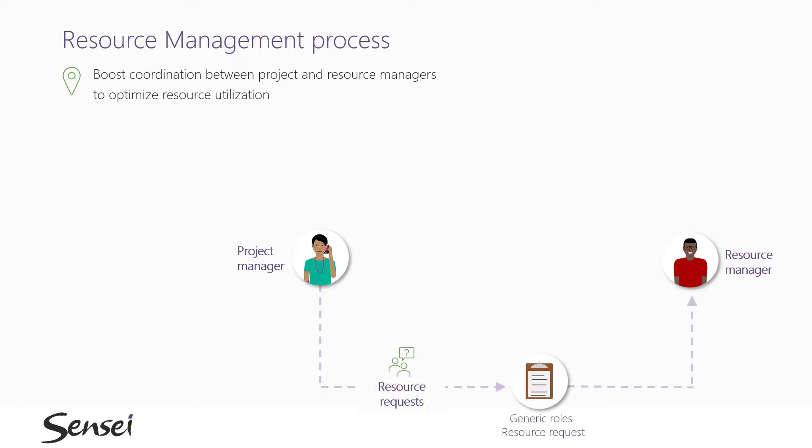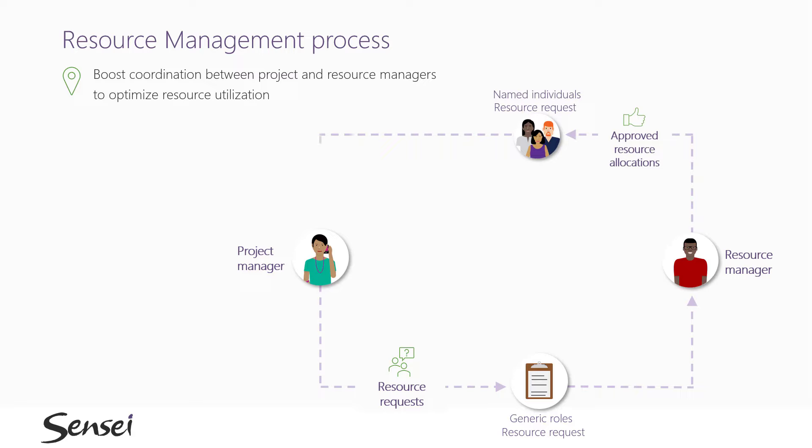Which you can think of as the resource budget for the project. The resource manager gets to approve these requests and allocate named individuals to the project. Now, the project manager can build out the detailed schedule with task assignments for the team, staying within the approved allocations, of course.